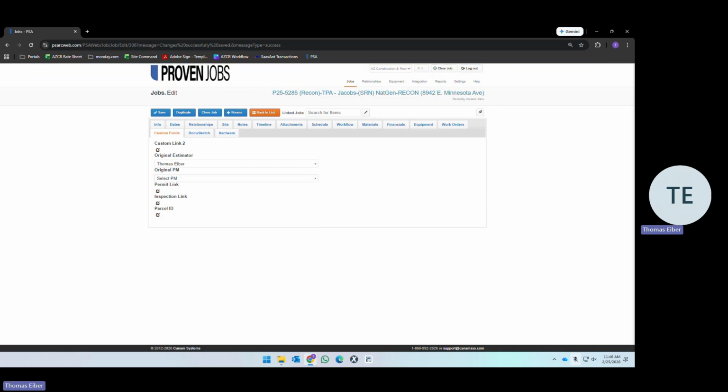Okay, so field photos and documents are some key data that project managers put in. You're going to upload any photos you get from the field, any documents you get signed, they immediately get uploaded into PSA and they are no longer your responsibility to upload. They don't belong on your phone, they belong in the system so we can all access them. Final sign-off status, so the COS, the Certificate of Satisfaction, or the project sign-off, a PSO, is the final sign-off status that you're providing to the operations manager, and you're putting that into PSA as well.